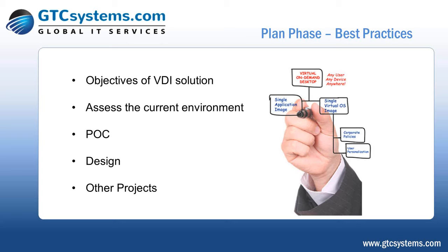And then consider other projects that are running at the same time as your VDI deployment. We've had to pause a couple of projects just recently because they were upgrading their network or moving to a new data center. There are other variables going on in your data center while you're trying to do a VDI deployment that will make it more or less difficult to do that deployment if you're moving things around on the back end, right?